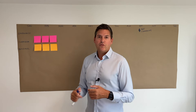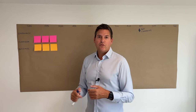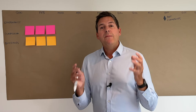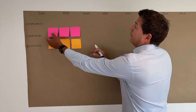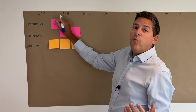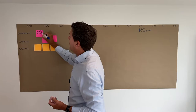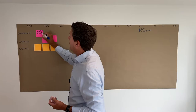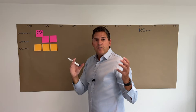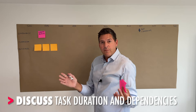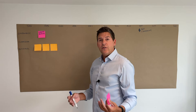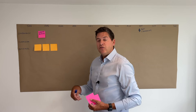For each work stream, ask the group — because in facilitation, the group is the expert — what are the tasks that need to happen? People will often tell you the order things need to happen, so you can immediately start putting post-its up. For example, in governance we might start with a current analysis. The question to ask immediately: how long is that likely to take? Is it something we can do today, or do we need to gather information and talk to lots of people? Have a conversation around the room about that.